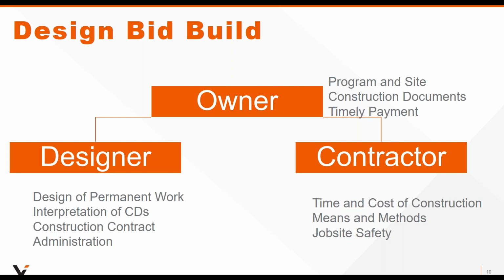They will take your construction documents in their contract with the contractor and make that part of the contract to the contractor. And they will tell the contractor, here's the construction documents. We will pay you, and you will take responsibility for the time and cost of construction, means and methods, job site safety, and so on, and you will give us that completed facility.